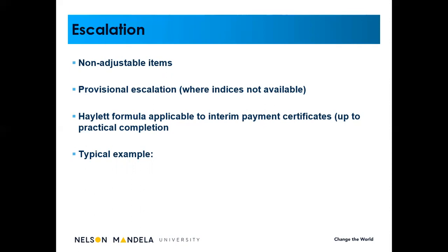Day works is an extra on the project, in the form of a contract instruction, where the contractor says, well, I will price that contract instruction at current rates. In other words, we might be halfway through the contract and there's a contract instruction, and the contractor will decide, well, I'm not going to use bill rates. I'm going to price that specific item at that specific point in time. In other words, we refer to that as current rates. Day works will always be an extra on the project. So for those 3 items, profit, attendance, and day works, there is no escalation attached.